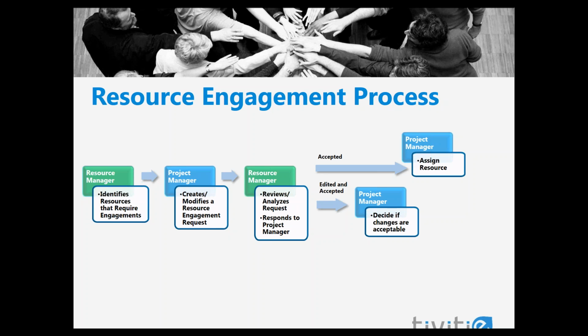If the project manager submitted a request for a generic resource, the resource manager will edit the request and identify the specific person that will be assigned to the project. Then the resource manager will accept the edited engagement.